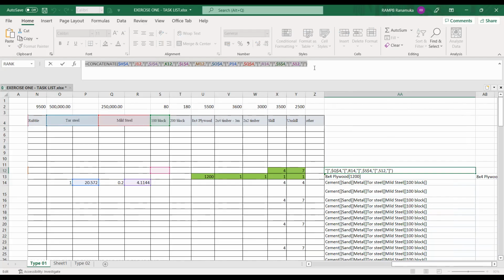So this formula will make it easy to assign those resources without going one by one. We have to do this only one time in MS Project, and just copy that to our Excel sheet. From the Excel sheet, we can just use this formula for the first place only, and we can just drag that item to the other items. We can automatically copy and paste to MS Project, and it will automatically give those items.